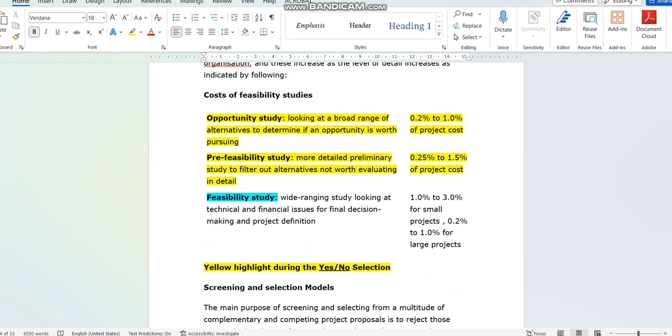Is the factory space big enough to build another line, or to add something else? Is the land big enough? These are technical issues dealing with the ground conditions, the weather, the logistics, the geographical condition, the terrain, the topography, surveys, and all that. So you need to understand the technicality.